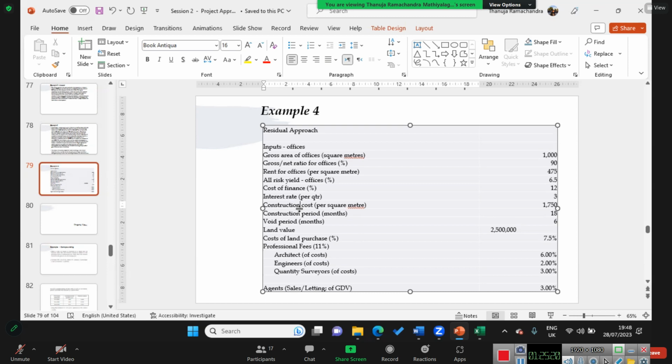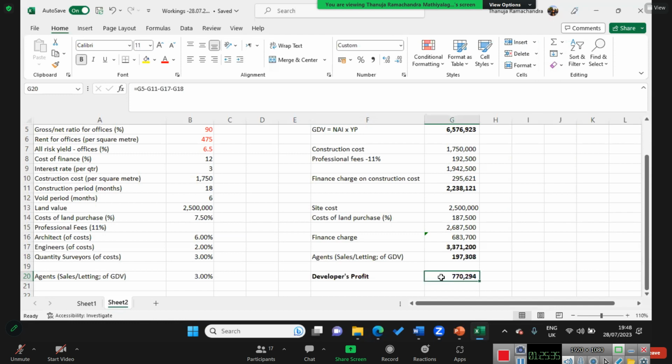So therefore, even for 2 years, it is important we take the time effect into the appraisal. Okay, so therefore, we should say, for example, this profit, the profit that we calculated, it is actually coming in 2 years. Say if development period is from now, it's 2 years, right? We are expecting to complete and get the return. Okay. So now this is 2 years thing. Say for example, this and this are maybe within first few months, first maximum, let's say 3 months, isn't it?